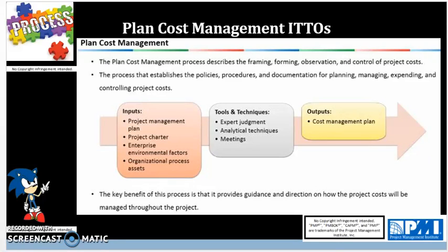Net present value, you'll see on the exam, is basically taking the planned value minus the overall initial cost, and the project with the highest net present value is the project you are going to do. So test questions will look like, which project would you take? So you have projects A, B, C, and D. Anything with the highest number is going to be chosen. And internal rate of return and ROI are secondary, but NPV is usually the give-all. And internal rate of return is basically the percentage of return you're going to get from this project. Typically, you won't be tested on this.